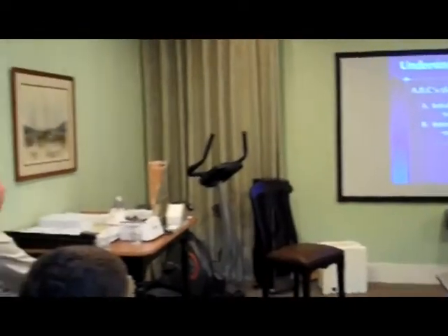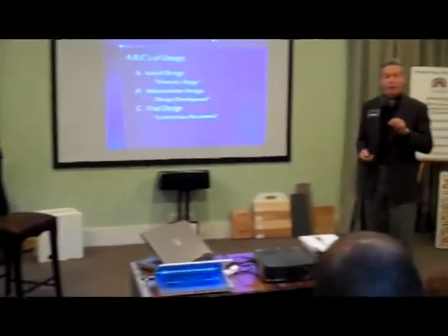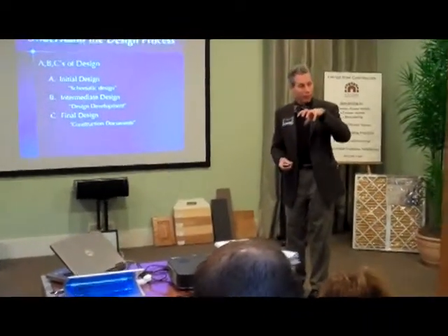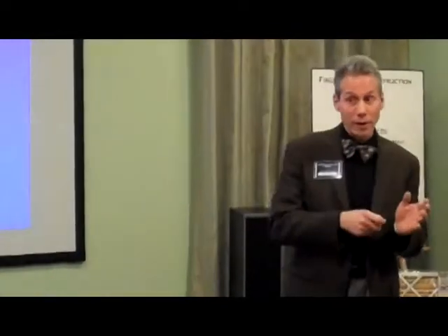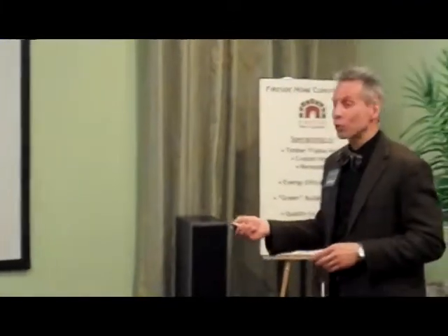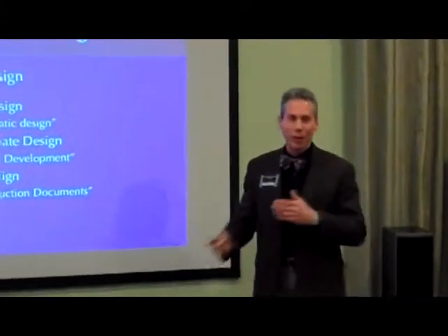Now at the final design step, which is what we call construction documents, now we're putting on paper the precise, specific number of sticks, number of bricks, number of nails, all those things that Bob's going to need to use to put together your final pricing and to use for final financing. So that's kind of the instruction manual, if you will. In fact, in our office, we always say we do the construction documents for Bob. We do steps A and B for our clients.